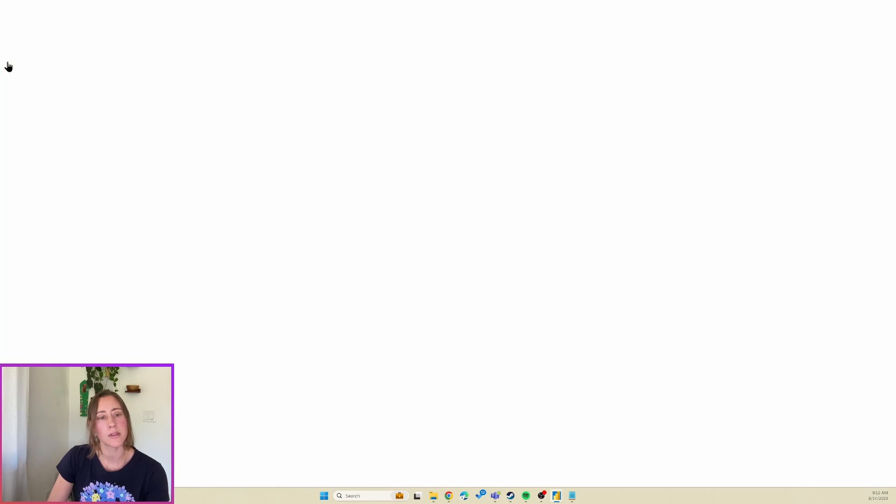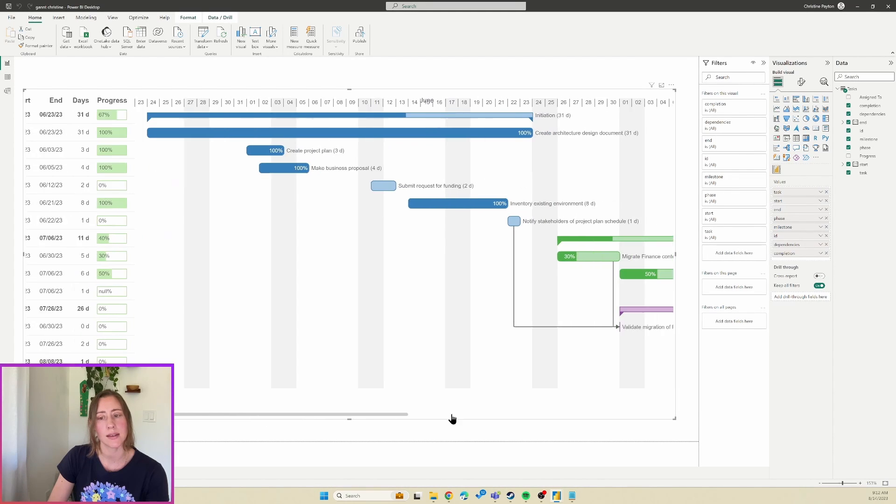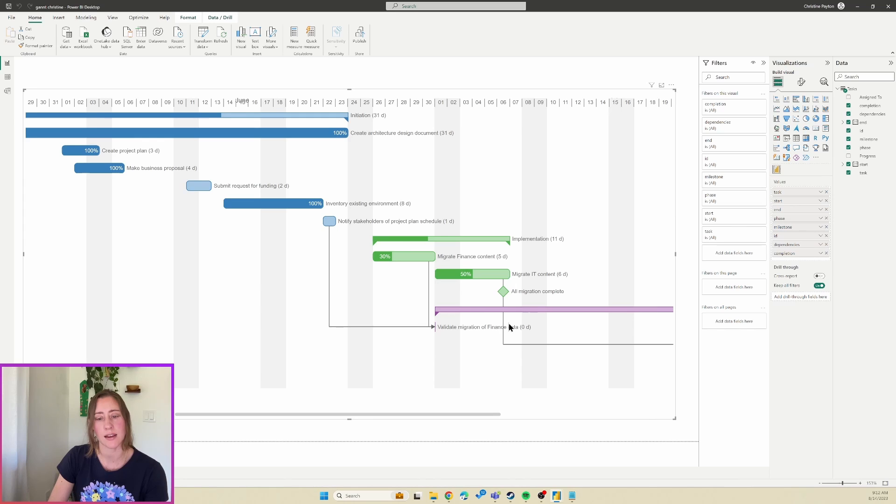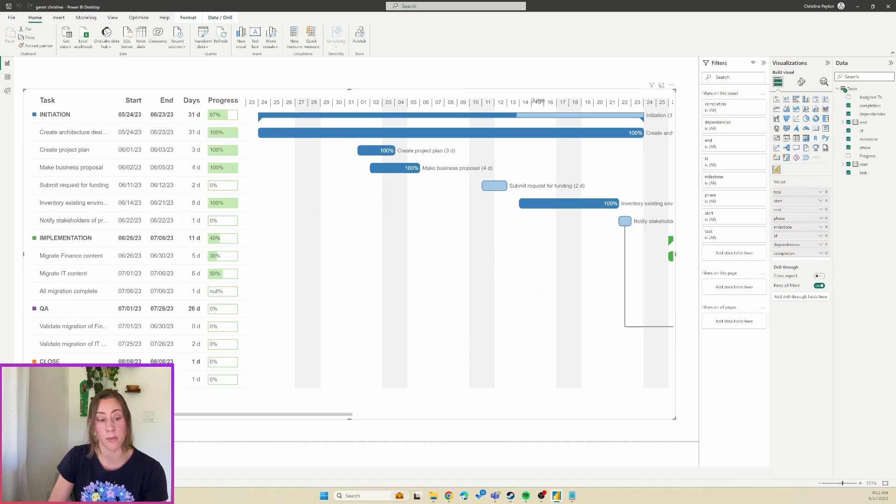All right, now what's going to happen, let's see. Oh my gosh, it worked! So you can see that both of these are dependencies for this task now, so it looks like comma separated is the way to go. Just make sure that your format for that column is a text field if you are comma separating multiple dependencies.